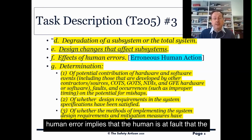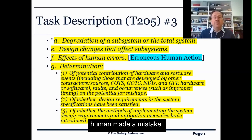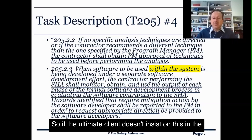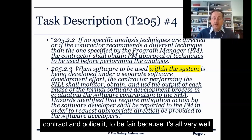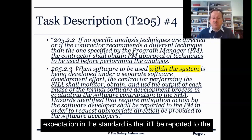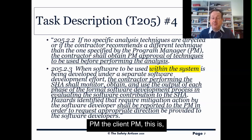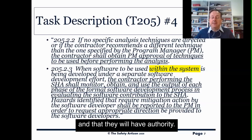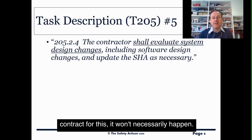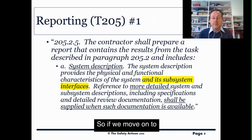Human error implies that the human is at fault — that the human made a mistake. If you don't ask for it, you're not going to get it. So if the ultimate client doesn't insist on this in the contract and police it — because it's all very well asking for things — if anything requires mitigation, the expectation in the standard is that it'll be reported to the client PM. And if the client doesn't contract for this, it won't necessarily happen.